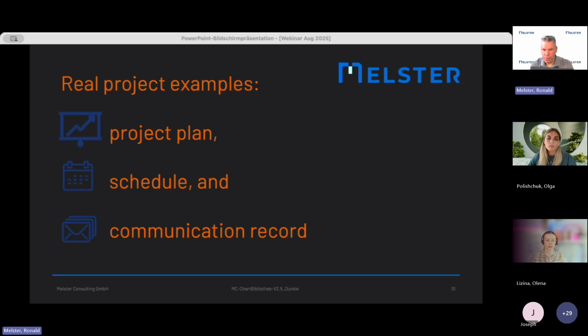And both of these schedules, the MS Project or part of the project plan, and the team level schedule, are instances, I call them instances, of the same information item schedule. However, they can exist in different tools. For example, the overall schedule, as I mentioned, in MS Project or Airplan, while the team level schedule is typically organized in a tool like Jira.